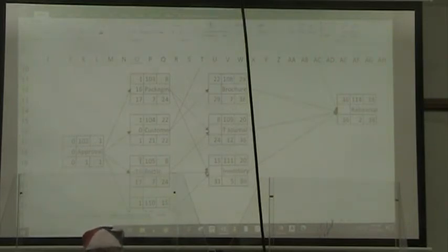And you can see that's 16 time periods. And production test equals late start minus early start. Okay, so once again, we have some slack in all of these except identifying customers. So identifying customers looks like it's kind of important.